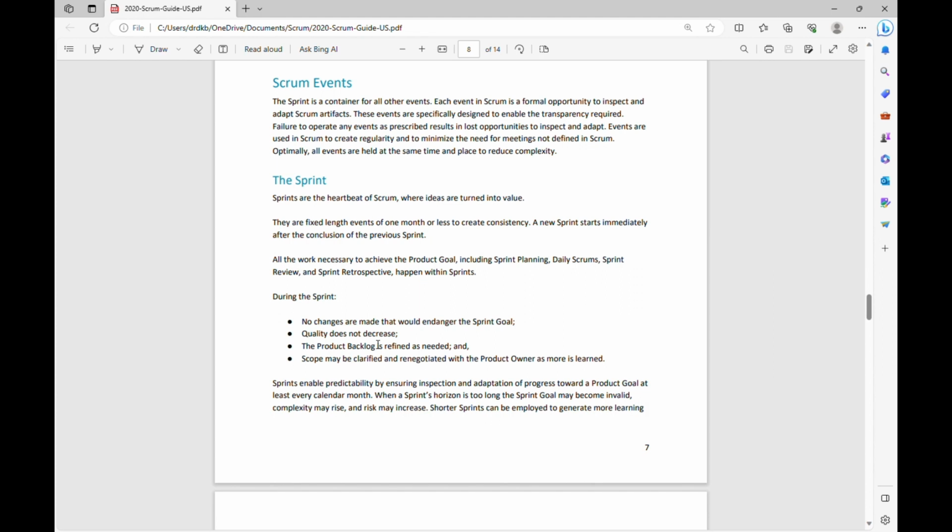The Scrum makes it very clear that quality will not be sacrificed. Instead, if necessary, Scrum sacrifices the scope in order to guarantee quality. So, if the team feels at any point of time they will not be able to reach the goal, this is one of the examples that due to any reason, if the team identifies that they'll not be able to complete the item and they want to compromise on the quality, that is not acceptable. Instead, they can work with the PO to reduce the scope, but whatever they are delivering should be of good quality. They should maintain the quality basically. So that is what the second point is about.